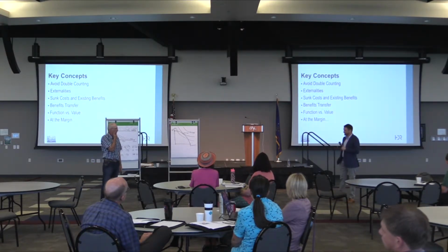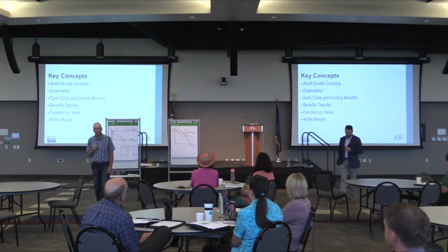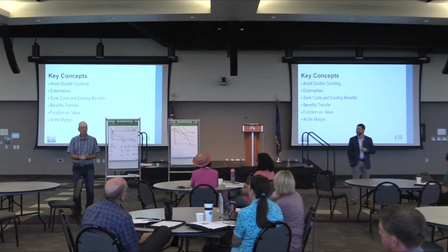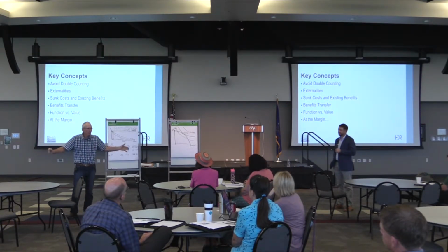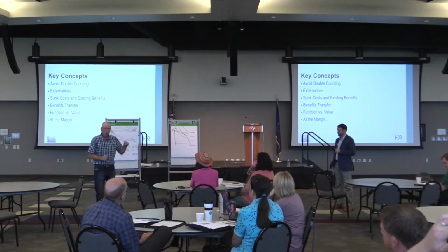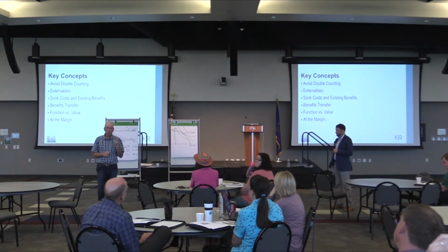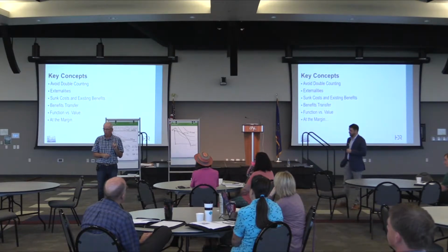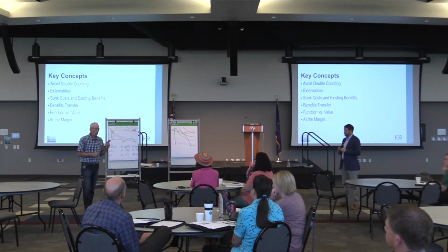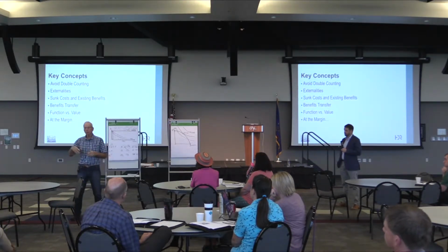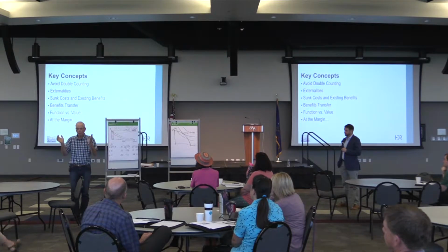Some key concepts, some nuances that we need to think about. When you're doing benefit cost analysis, if you're trying to make a project look good, you think of all the benefits that you possibly can, but don't double count. Don't count the value of increased agricultural production due to flood control and the increase in the value of land. You're counting the same thing. Don't count the value of a duck plus the value of a duck hunter, because there's overlap there. They aren't entirely the same because you have duck lookers as well as duck hunters.